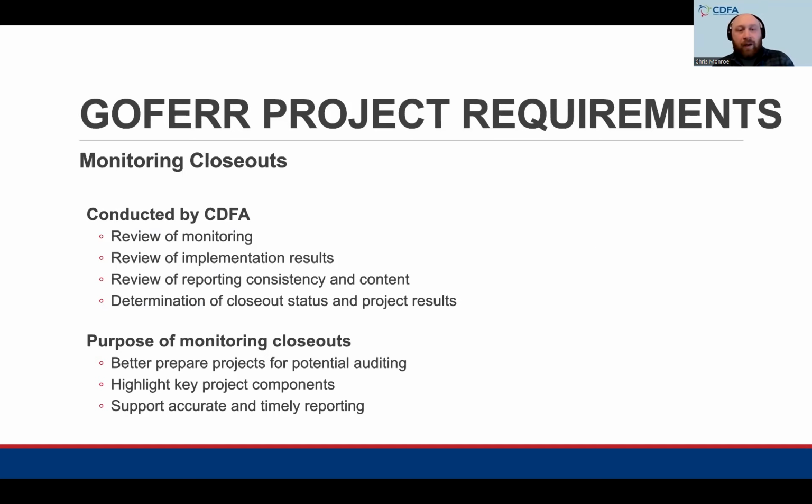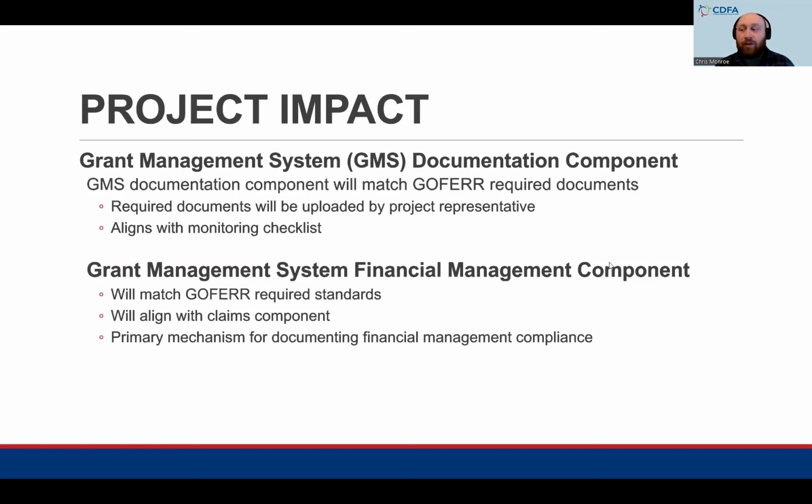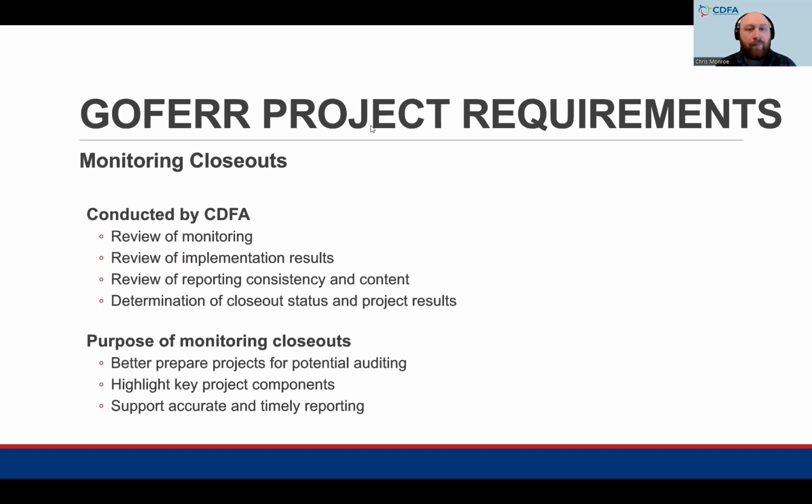So the next stage after we go through the risk assessment process, we go through some monitorings. Higher risk projects are subject to slightly more frequent monitoring. Sorry, can you go back, please? Thank you. And that's just a matter of us working with you to get the documentation up to date. Once you provide those documents, the risk rating will be lowered, and we'll have less frequent check-ins related to that. So the monitoring closeouts are conducted by us, CDFA.